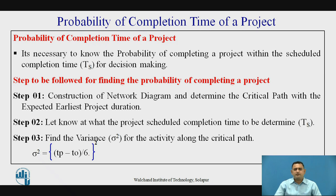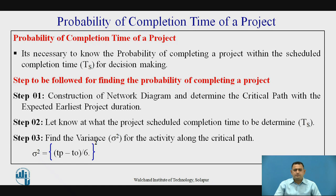Now let's see the probability completion time of the project. It is necessary to know the probability of completing the project within the scheduled completion time, denoted by ts, for decision making. The steps to be followed for finding the probability completion time of the project are: first, construct the network diagram and determine the critical path available for the particular project. Next, determine whether we need to find the scheduled completion time or the probability of completion of the project.